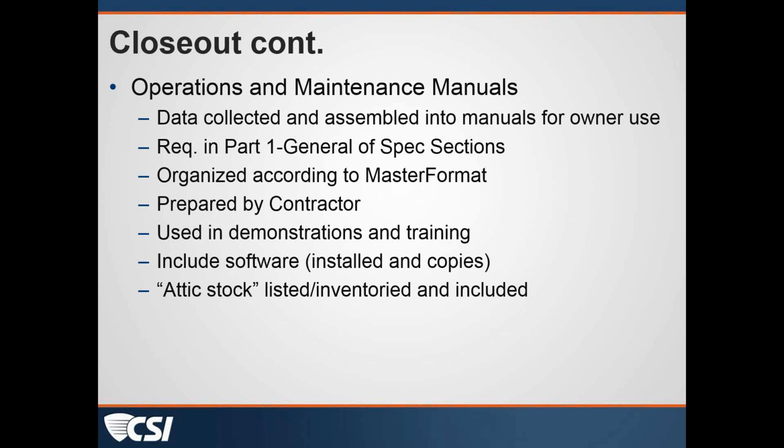Please talk to your customer, talk to your client about attic stock and what they actually want and what they specifically do not want. We often as practitioners have attic stock included in our specifications that the owners don't receive as a percentage of carpet, for example, that's been installed, nor do they actually have the facility to maintain it.